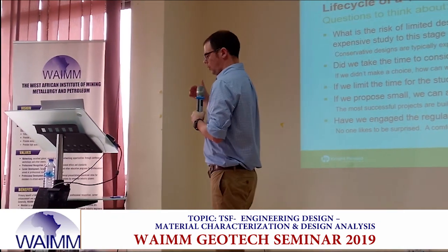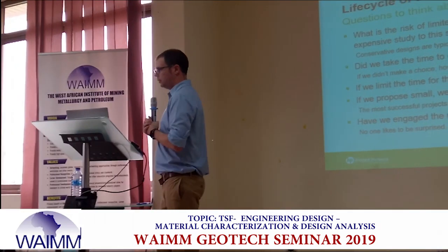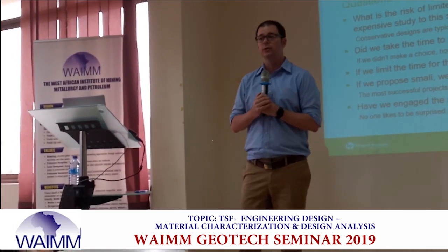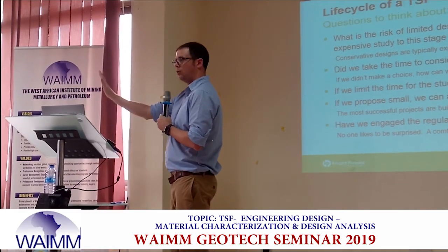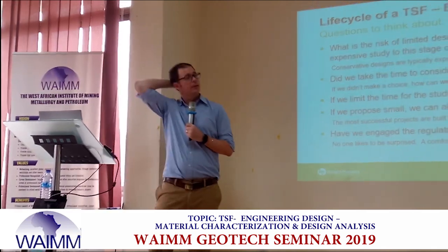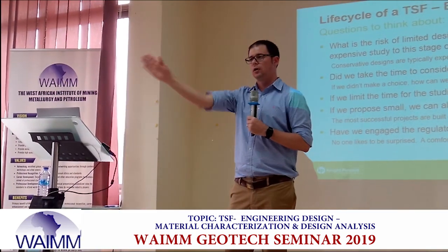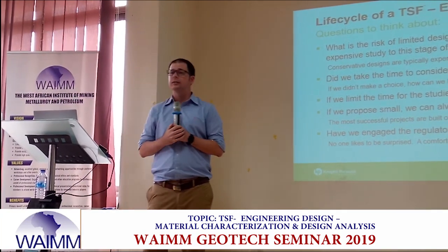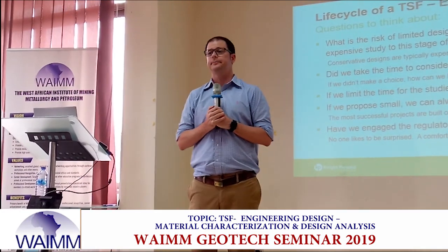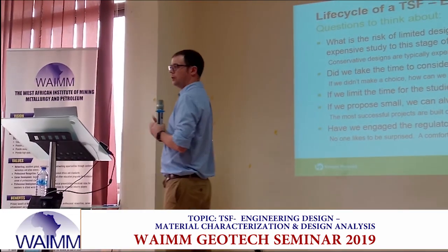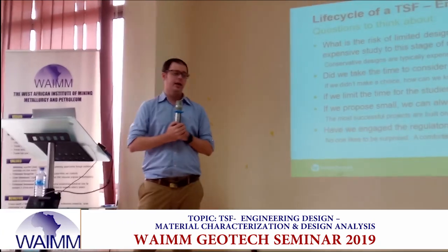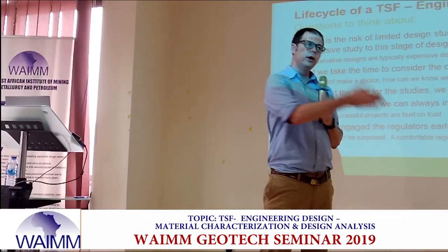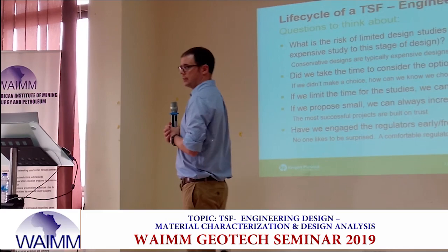So we went through, and the client came back to me and said, we just wanted you to look at these for your information. We're going with the lowest bid, so you don't have to worry about going back and asking these other guys questions. We've made the decision. We're going with the lowest bid. As we get into it, it turns out these guys bid low so they can win the work. And it's just change order after change order after change order, to the point now that the client has spent more money on the low bid contractor than they would have with the guys who actually thought through the process.